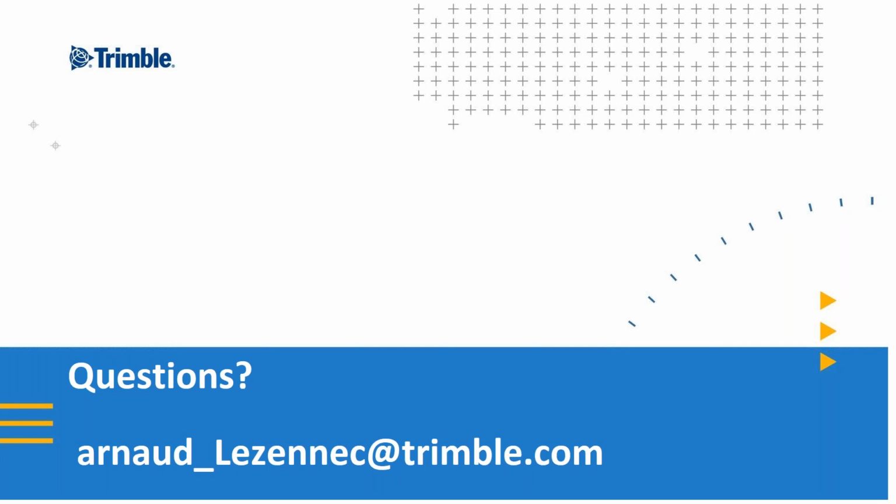Long distance large project, X. Yes, so David, how long were they in the field working on the scan, and was the only output for the client a DWG file? The project took 3 days. Again, it was the first project for those people. So the first day they spent a lot of time learning the software, which they had never used before, and learning the ropes of the project. And I think Yannick could correct me if I'm wrong, but it was 405 scans. So they did it in 3 days.